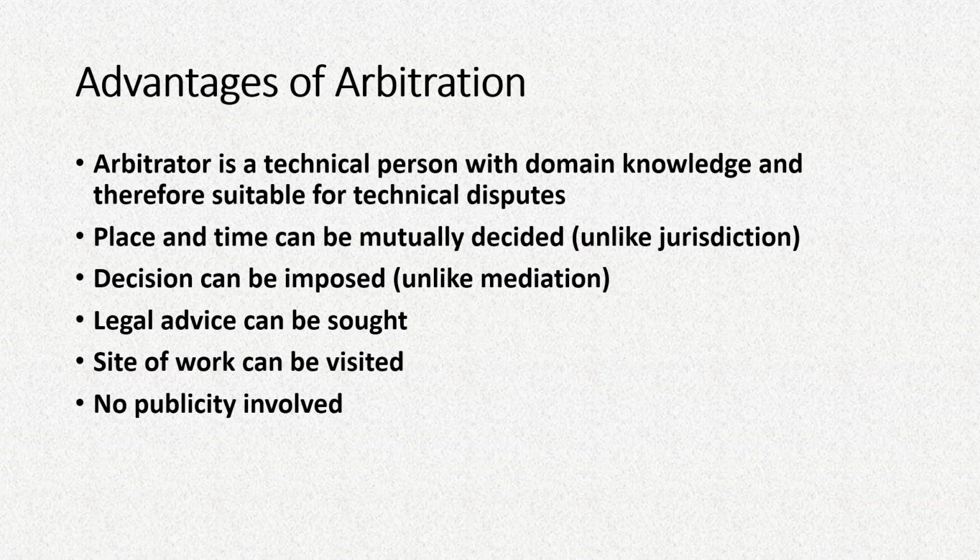But in case of an arbitration, both the parties can decide that we'll sit in this office or that place and then invite the arbitrator. Again, the judgment by the arbitrator can be binding, unless challenged, of course, which is not the case in mediation, where mediation is only a suggestion.